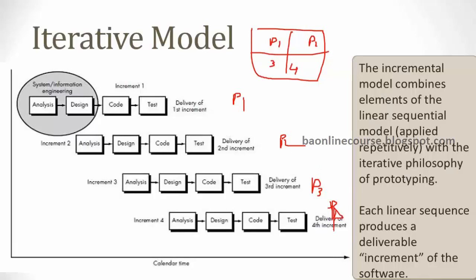In each phase you consider it as a whole project and go through delivering it, right? So you're doing your requirement analysis, design, development, testing, and then delivering to the end users. While the users are using it, your second implementation would start. That's the advantage of an iterative model. You don't have to wait so long to start using the complete functionality.